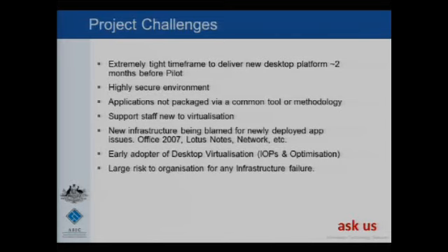No, we weren't using linked clones. We've got full, fat, persistent desktops. Again, 2 years ago, linked clones were released in the version that we rolled out with, but it was going to add risk to this project. If I have my time again now, and we're delivering a VDI DR pool, that's all stateless, and we run that in non-persistent mode, and we use linked clones.